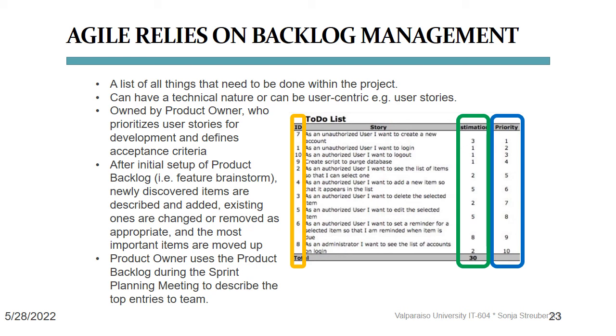Then there's another really important column, perhaps the most important column for all the technical people on the team who are going to build the product, the estimation column. As you can see, this column contains numbers. These are called story points. Story points are estimates of effort. They depend on the amount of work required to build the user story, the complexity of the work, meaning how hard it is to build, and the risk and uncertainty, especially if this is something the team has never built before.